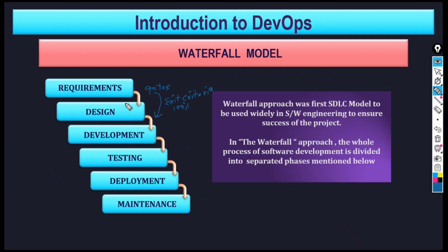When can you go from requirements to design? What are the exit criteria, and an approval process? So somebody will approve that, okay, now this is over. Now this gate is closed. You can move on to the following gate, the design gate. Who will approve? You already have the knowledge. We have discussed. Each of these stages will need to be approved by whom? The project manager.